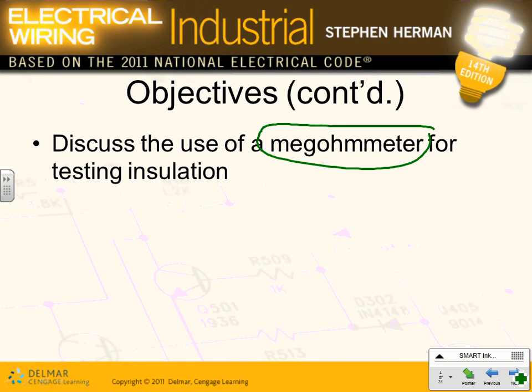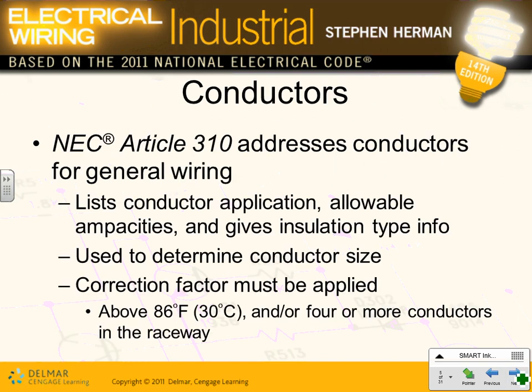So on most high-profile projects, hospitals, sport arenas, part of commissioning the building, they call it commissioning, guys, before they energize, is to measure it. You'll look at it in a second here. That's a big deal.